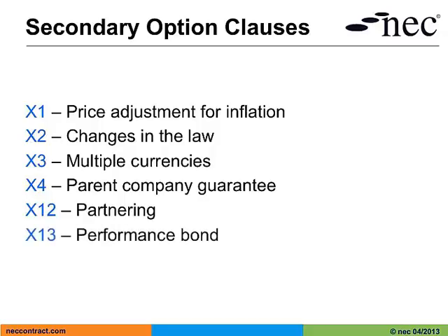X13, performance bond. This option requires the contractor to provide a bond to secure his performance of the contract. X14, 15 and 16 are not used in the term service contract.